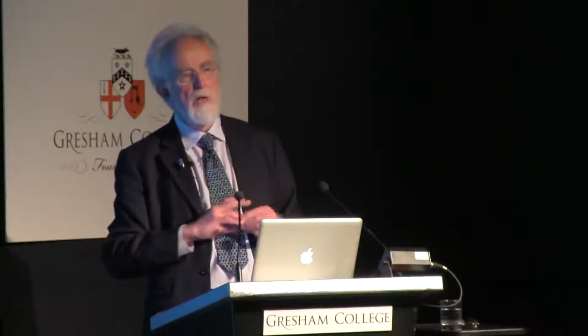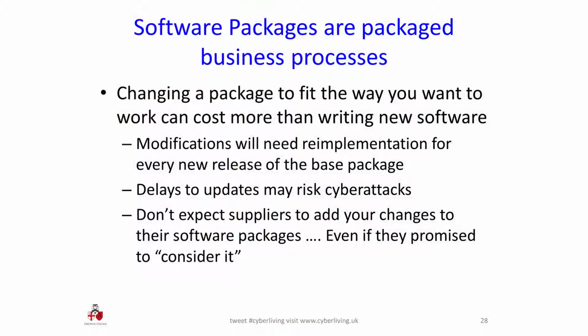So every time there's a security update, you get to choose. Do you want the security update now, or do you want to wait until you've actually had the opportunity to invest all the time and effort in moving your changes into the new code base and then re-implementing it? Meanwhile, of course, you're exposed to the security risk because the vendor, in bringing out a security patch, has implicitly announced to the world what the security vulnerability is.